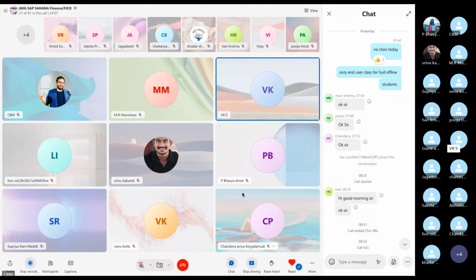After the implementation phase, we go to the troubleshooting level. In this phase, we provide hypercare support. We provide support for initial errors or issues for at least 2 months after the configuration of the SAP project.